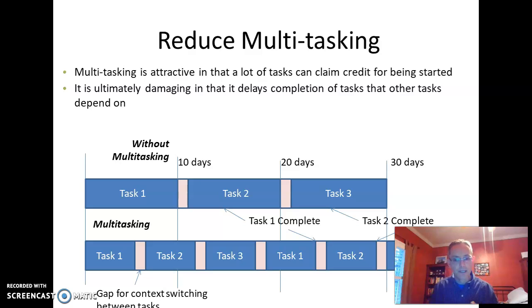And the person sitting there waiting for it, when it was supposed to get done, is not going to get it until much later, because that person absorbed a couple of other tasks. That's going to have a ripple effect in project delays, and so you have a huge amount of project delays. Not to mention that all this context switching, even if you didn't have those delays, pushes out the whole duration by a fairly significant amount.